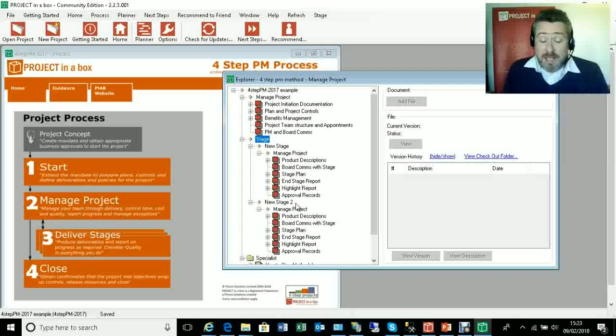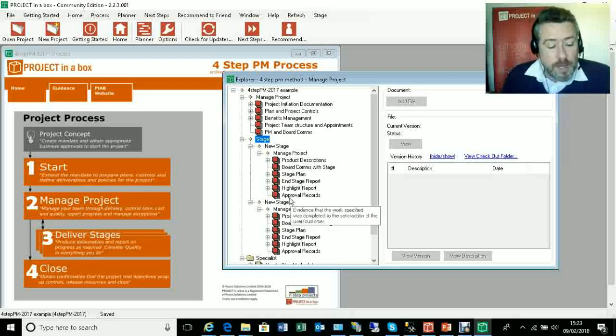It's like when we talked in session 6 about delivery, and we talked about delivery sometimes happens in blocks. So that's exactly what this stage is. When you've got a more complex project, you're going to deliver things in units. And in a waterfall type sense, you'll deliver one unit, you'll make sure you're happy with that, you'll go back, you deliver the next one. In many projects, of course, people deliver these things in parallel, some of them. Some in parallel, some in series, some overlapping. But the tool is there and structured so that you can do that. And the 5-step method works in a very similar way.